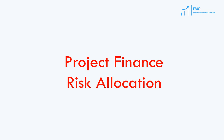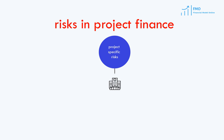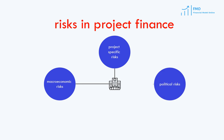As in any business venture, the project company in Project Finance faces four types of risks: Project Specific Risks, Macroeconomic Risks, Political Risks, and Natural Disaster Risks. It is the efficient and structured allocation of these risks to the parties most capable of managing them which makes project finance possible.